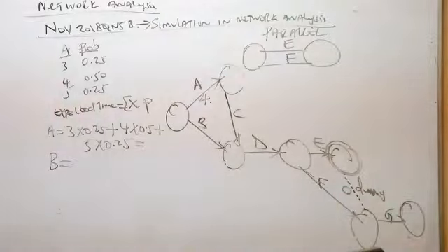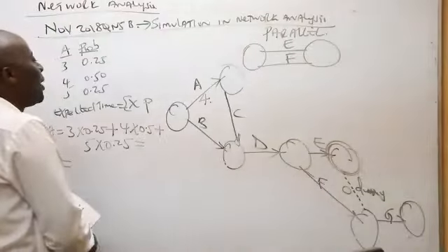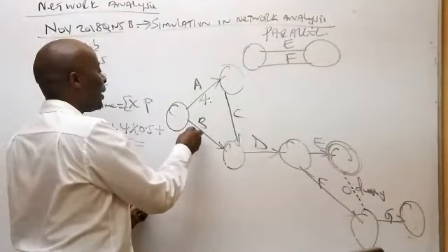So for B, I can see the 3-time estimates. I'll take 4 times 0.15, plus 5 times 0.3, plus 6 times 0.2, plus 7 times 0.2, plus 8 times 0.15. Great. So they're telling me B is 5.9.